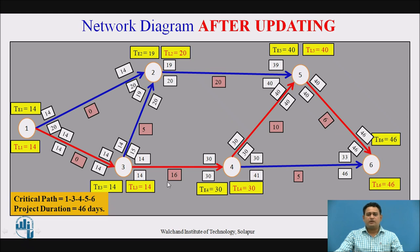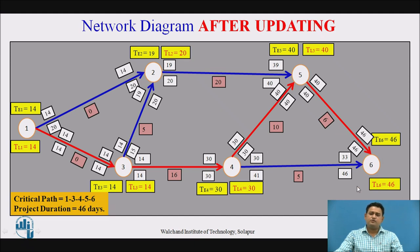This is the overall network diagram after updating. Again we follow the forward path to get the earliest start and earliest finish times for each activity and event, and follow the backward path to get the latest start time and latest occurrence time for each activity and event.